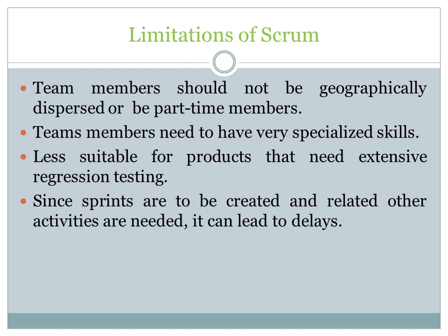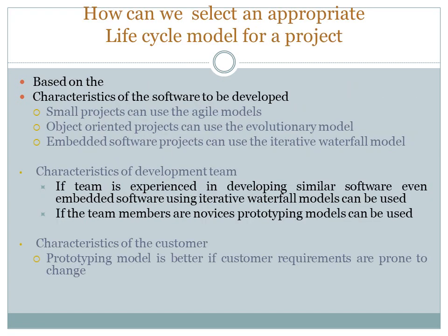So this is a comparison between the Agile model and the iterative waterfall model. In the Agile model, progress is measured on the basis of developed and delivered functionalities, while the iterative waterfall model is highly structured and systematic, and progress is measured in terms of completed documents. If the Agile model is cancelled midway, some code will be available of the work already done. And if the waterfall model is cancelled midway, there is nothing to show other than some development.